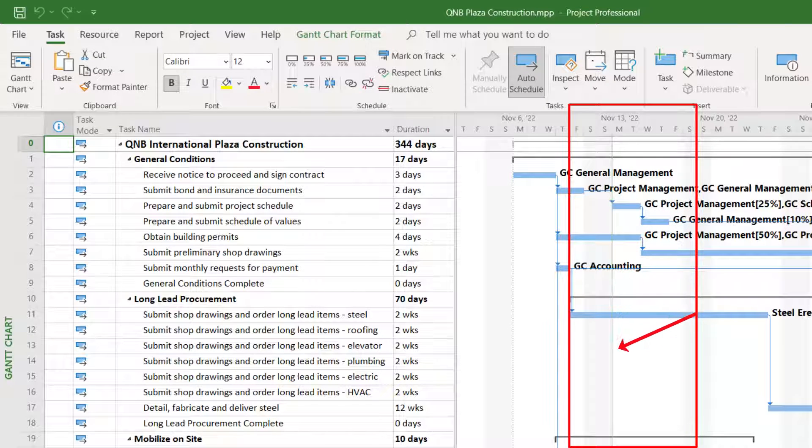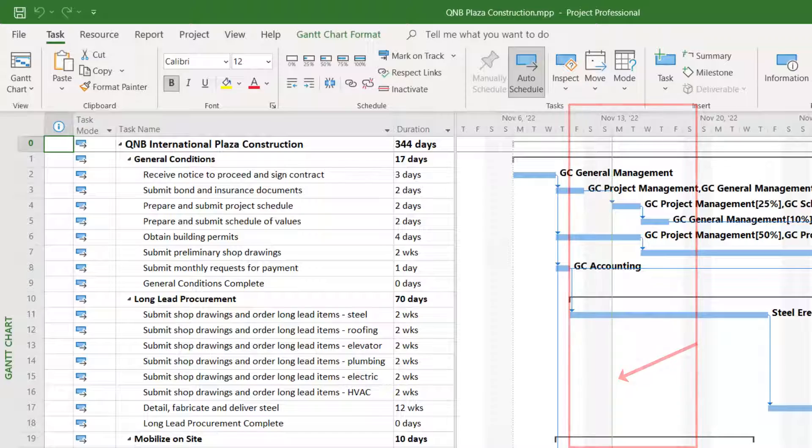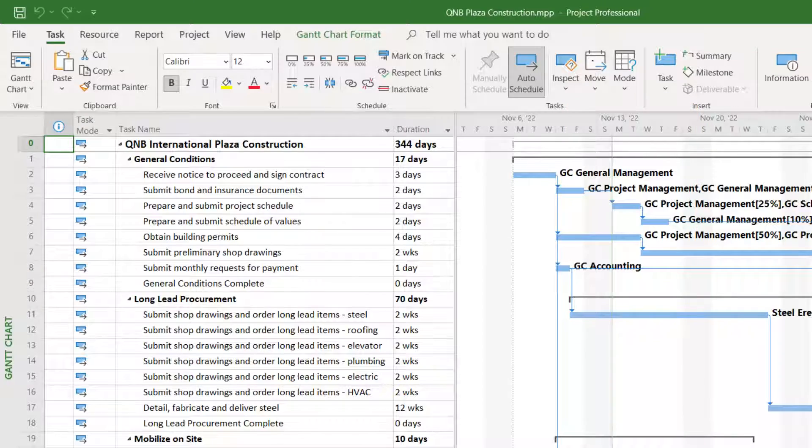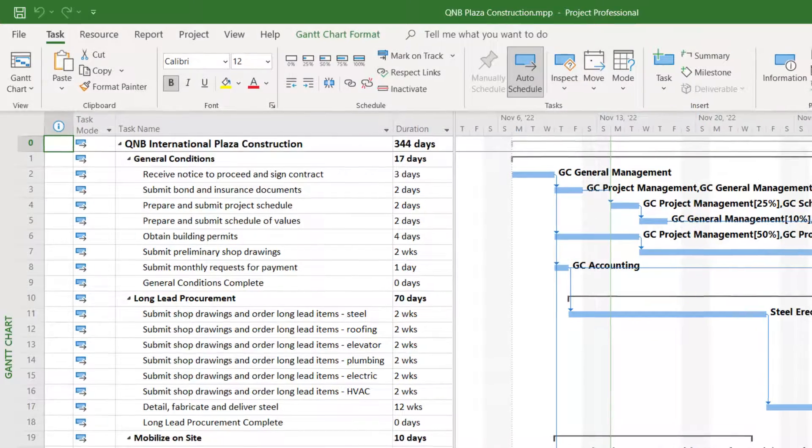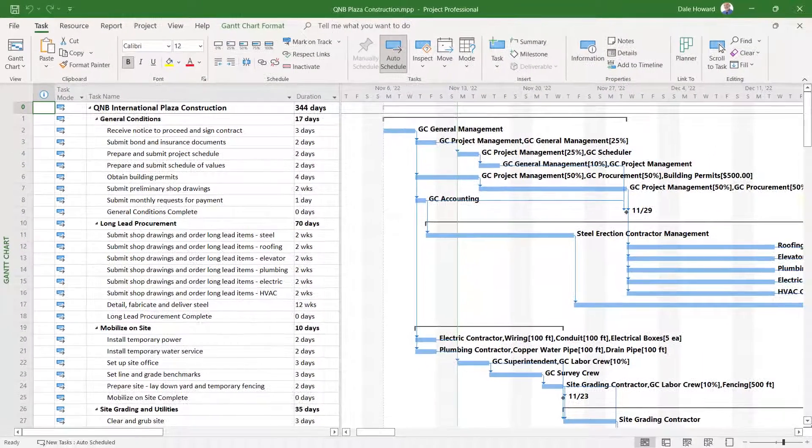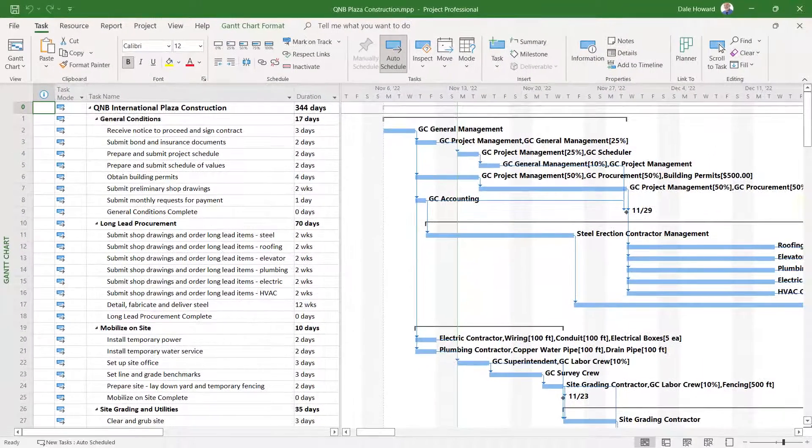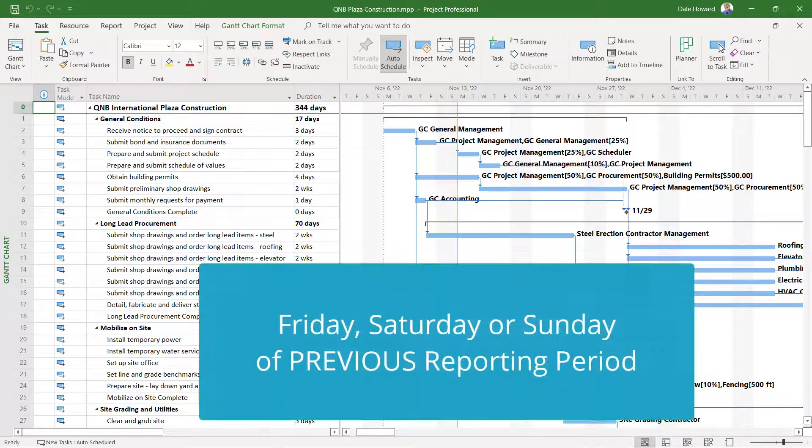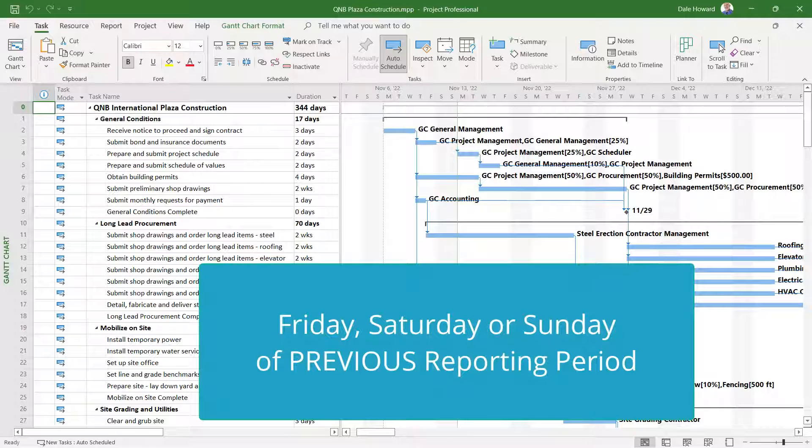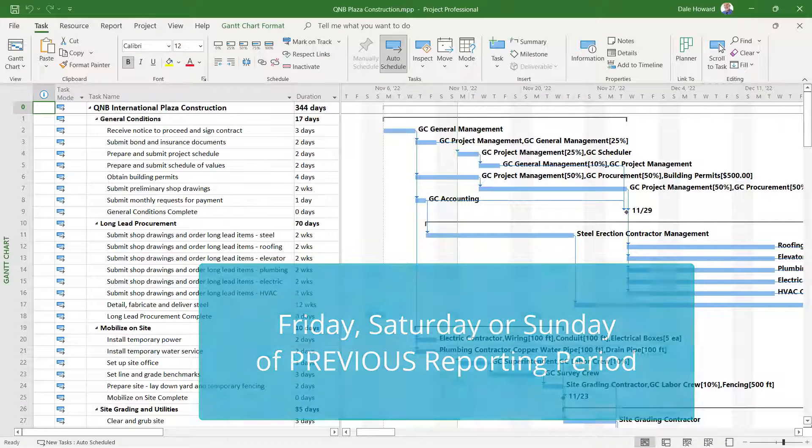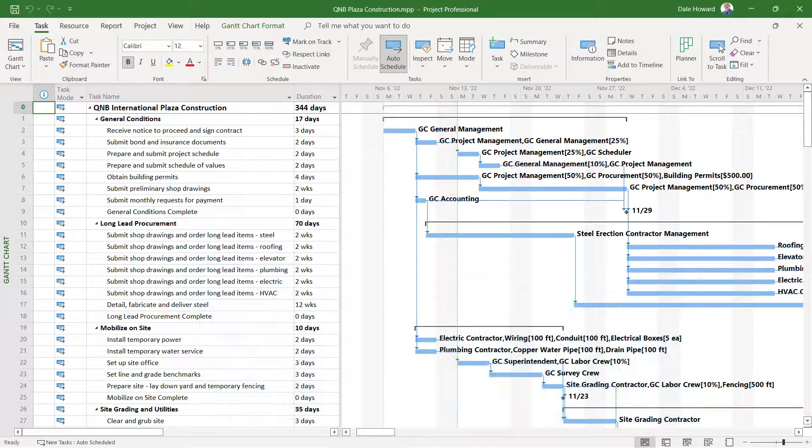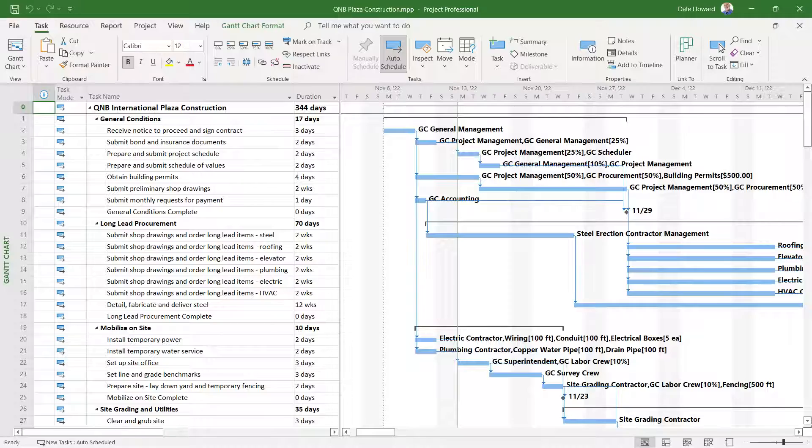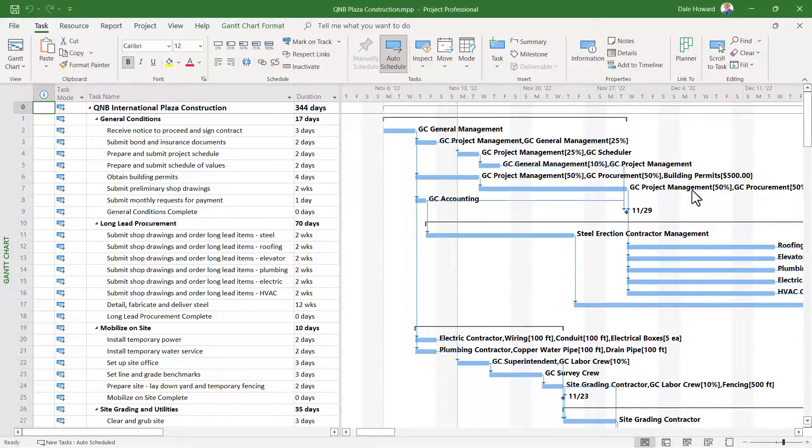I'm ready to set the status date for this project. Let me remind you that the status date is normally Friday, Saturday, or Sunday of the previous reporting period. Let me also remind you how to specify the status date for your project.